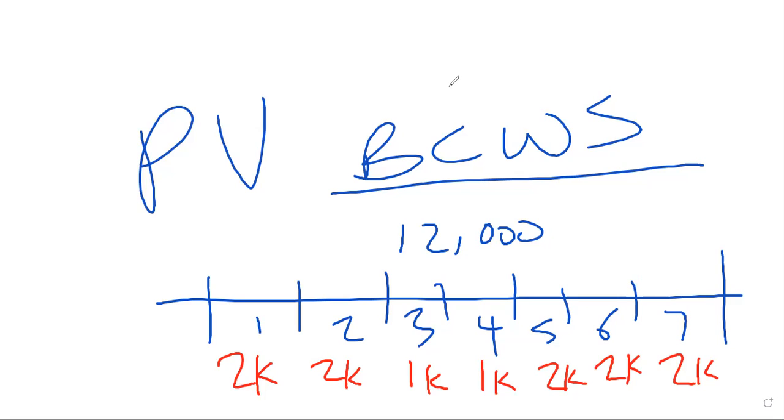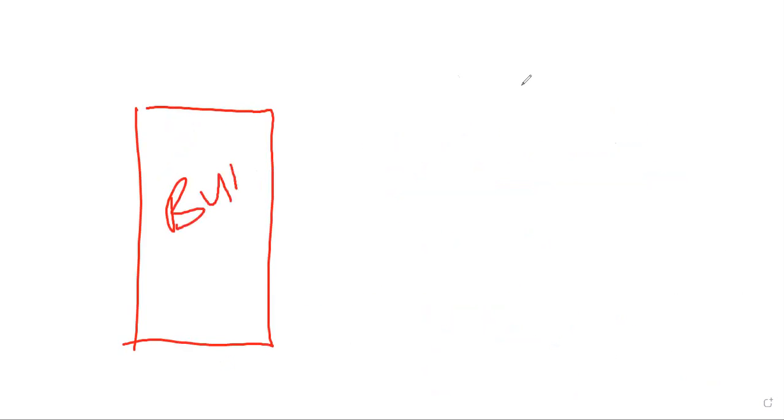I would have said less management reserves. But anyway, it says here in the next column, the value of total planned work, the project cost baseline. So if you take a look at page 255, it becomes clearer that you have the project budget, which is not the cost baseline, right?